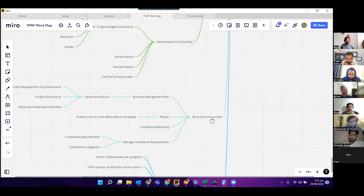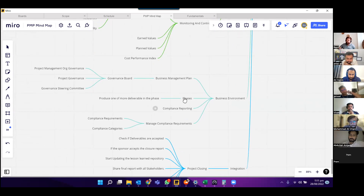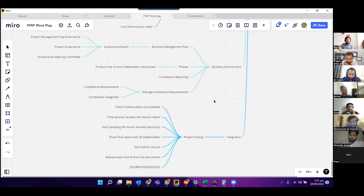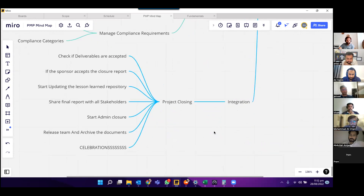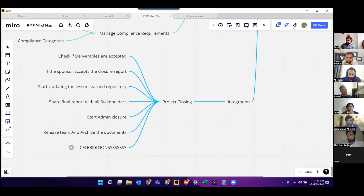On the business environment, we talked about the business management plan, governance board, compliance reporting phases, compliance requirements and categories. Finally, on integration, we discussed project closing: check if deliverables are accepted, if the sponsor accepts the closure report, update the lessons learned repository, do final updates with all stakeholders, start admin closure, release the team, archive documents, and celebrate success.